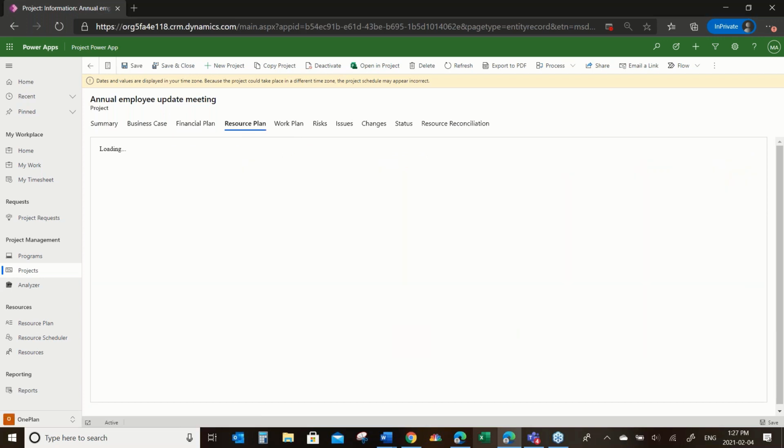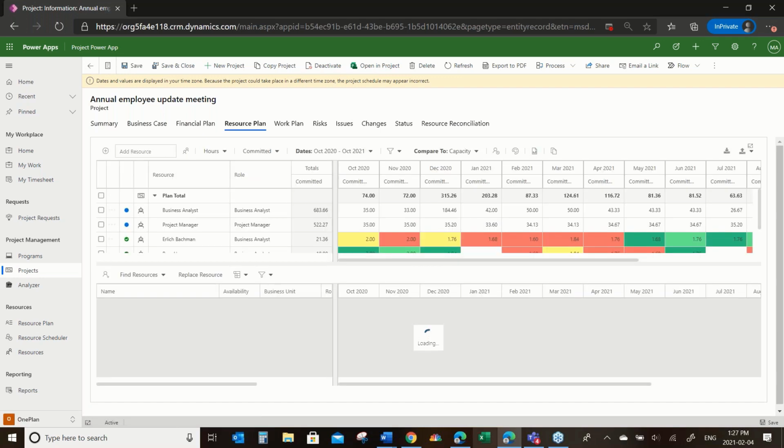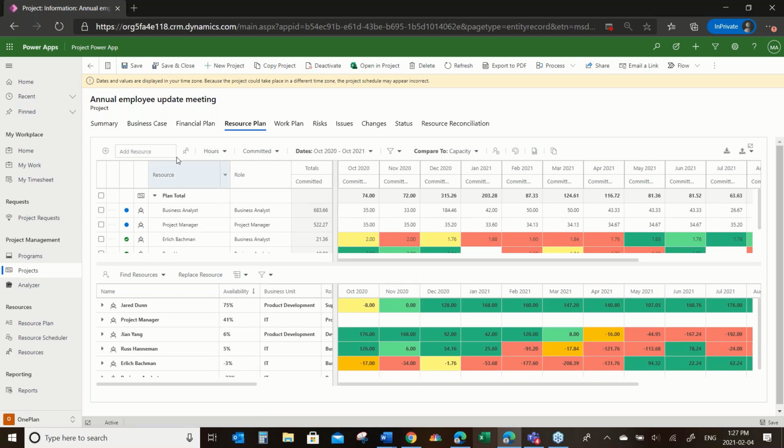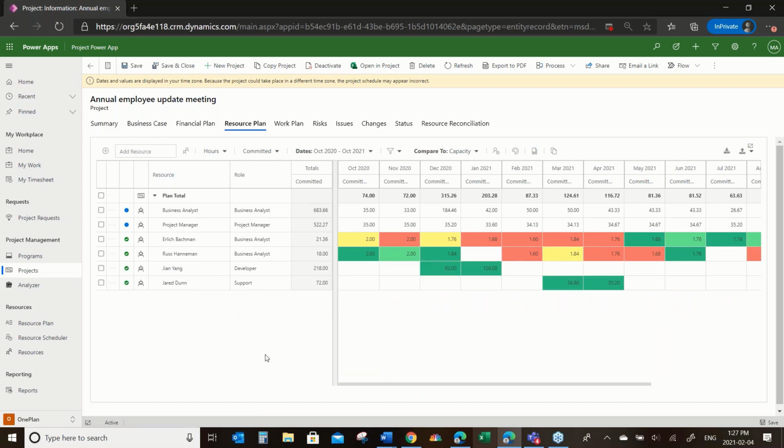Likewise, we've added some additional capabilities around resource planning. Now we can look at our resources in comparison to where they're being used in other projects. Let me turn this off for a second and look at my project team. Here you can see the resources that I have on the project, those marked with the little green check mark. They're active on my project, but wherever you see red, there's something there I might want to know in that there is an overage. Ehrlich is over allocated in that particular month, and I might want to, as a PM, look into that in greater detail.